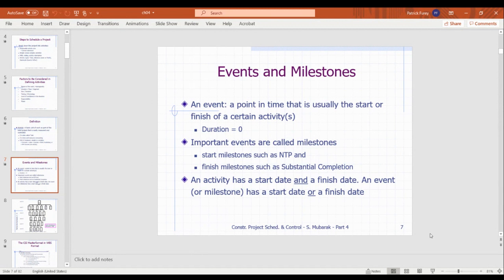So substantial completion, I kind of brushed on that. That basically means you're, I think it's 90% definition-wise complete in the project, meaning you are aware that there are still some outstanding items or outstanding scopes that will require completion. Like maybe you got to put sod down, maybe you got to wait a while to put that sod down, maybe you put grass seed down and you have to wait for it to fill in. Substantial completion is a formal document or process that basically acknowledges, all right, you're mostly done with the project. We got a little bit more to tidy up, sweep up, but substantial completion might allow the contractor to take all of their money, except if there's retainage on the project. So just a milestone, and it's a term you do run into once in a while.